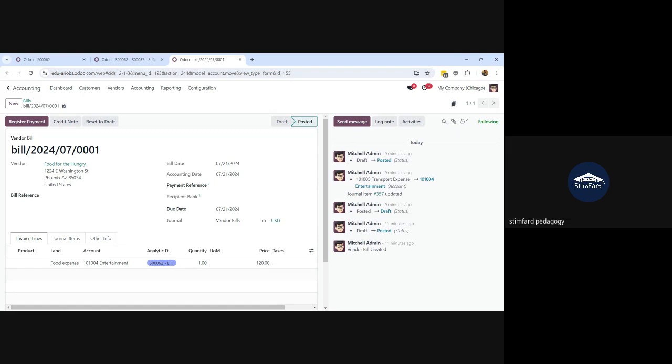So you are purchasing cement, you are purchasing iron material, you are purchasing bricks, you are purchasing sand. So you need to manage these costs with reference to the project. How you can do that, I'm just going to show you. You can also do the purchases with reference to your project, and those purchases would be reflected as a cost on your project.